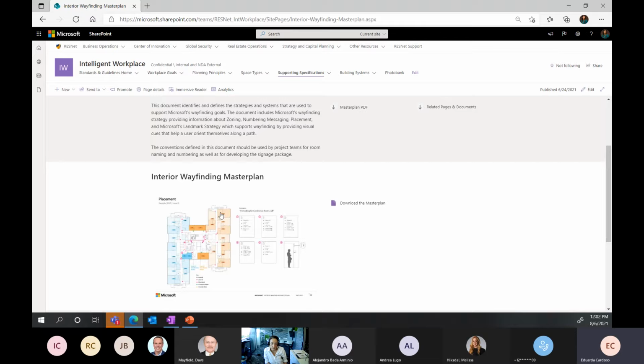It usually takes them a week. This is not a huge project, so they'll review it. Then we get feedback and we can adjust early on the project so it doesn't become a problem once electrical panels are numbered and all your consultants have to renumber, et cetera. So I would encourage that for sure.